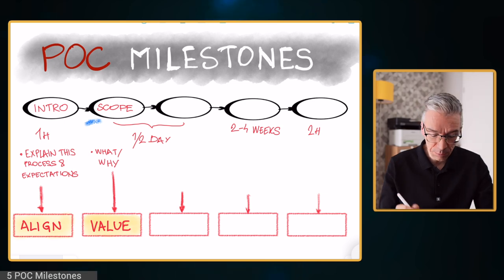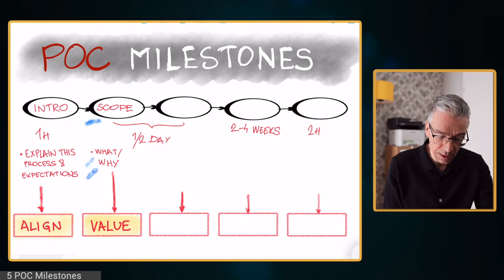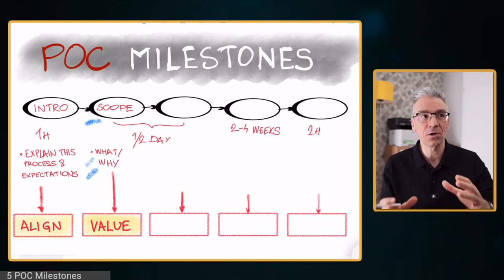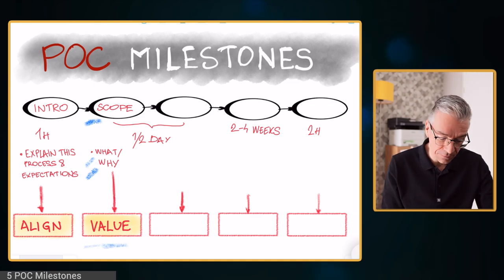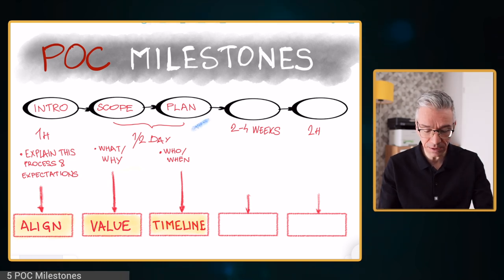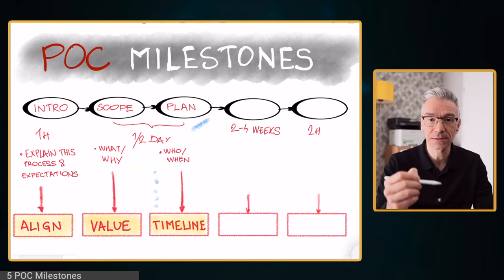For the scoping, it's really important that we determine what and why — what we are doing and why we are doing it — with the aim that we are all aligned at the end on the value we want to deliver. The second part of that workshop is to do the actual project planning. We want to nail down who exactly and when they are going to deliver, task by task — really nail it down to details. You want to know who is responsible for what, with tasks, owner, delivery date, and preferably a status field so you can track it as the POC progresses.